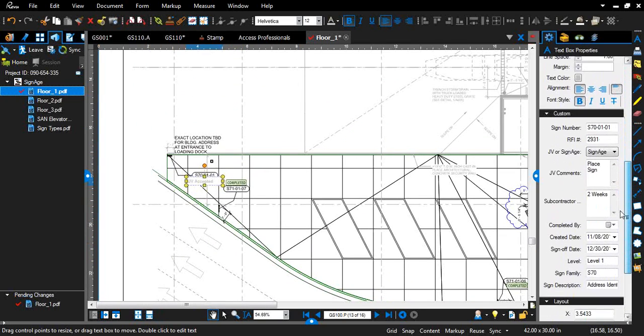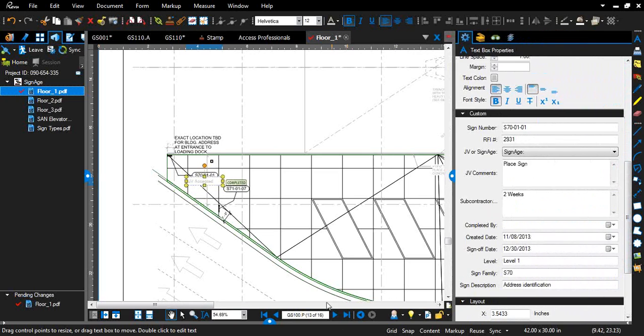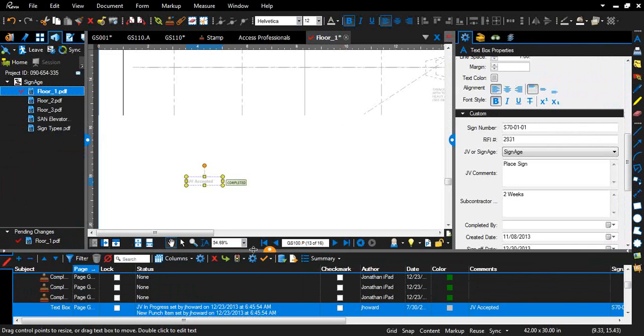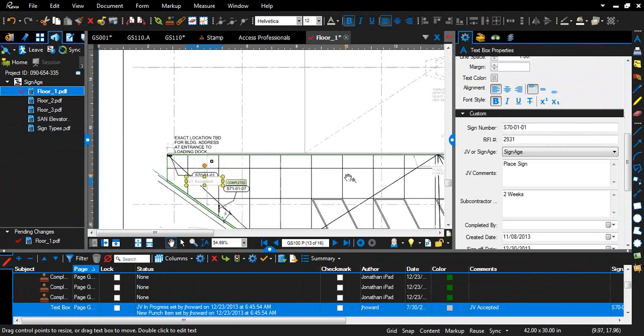When you send out the punch list, they won't get bogged down by all the drywall and acoustical ceiling items. It'll just be the plumber's items, so he knows he only has those 3 items. He won't have the excuse of not knowing where they were. That really alleviates the headaches you often have with punch lists. Where's the list with the log itself?